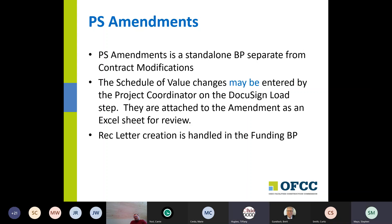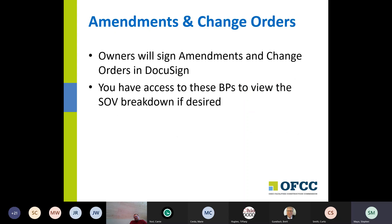PS amendments is now a standalone BP separate from contract modifications. Schedule of values changes may be entered by the project coordinator on the DocuSign log step, so amendments are set up the same way as contracts. In the case of an amendment where additional funding may be needed, the rec letter creation and funding process is handled in the funding BP, which we'll look at next week. Owners will sign amendments and change orders in DocuSign, and you do have access to review those BPs whenever you want.